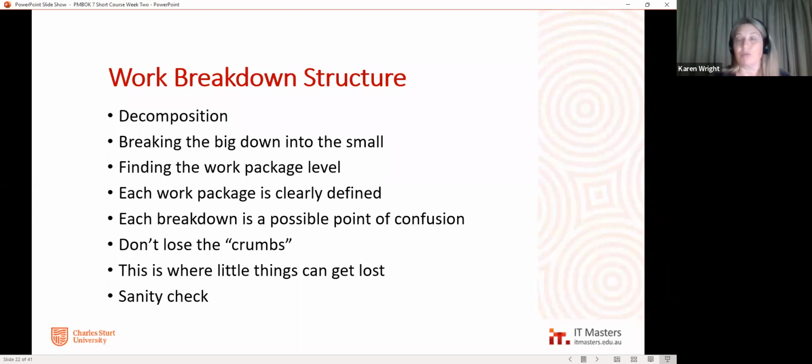Ultimately, you can also go to your sponsor or steering committee, your governance layer as well, and say, look, I've got some people on my project team that aren't performing. I've tried to counsel them, I've tried everything to support them. And it could be not that the person's not great at their job, they just might be overwhelmed. In a functional structure, it's not uncommon to see people on 5, 6, 7 projects. And it just means that they're exhausted and spread too thinly. I think that's probably the number one issue with resources in organisations these days, is that they're put on too much, and so that might be why they're not performing. So you might see if you can swap that person out for someone who's less spread thinly across the organisation.